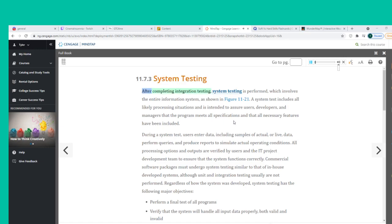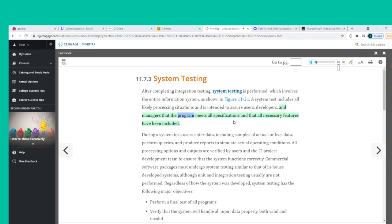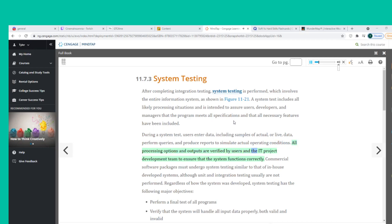After completing integration testing, system testing is performed, which involves the entire information system. A system test includes all likely processing situations and is intended to assure users, developers, and managers that the program meets all specifications and that all necessary features have been included. During a system test, users enter data including samples of actual data, perform queries, and produce reports to simulate actual operating conditions.